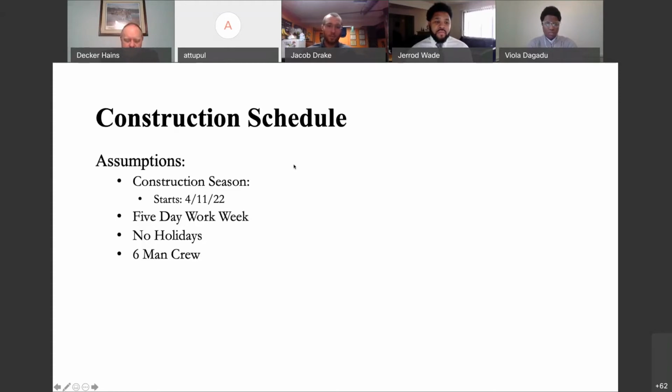We used BWL standards for a 5-day work week, no working holidays, and one single crew. Part of the reason we're only using one crew is because this shows us the longest this project should take from beginning to end. And also it'd be the most expensive this project would be. So if BWL had an extra crew, they could get this job done faster, but we wanted to show at the longest, what could this project take? I will now turn this over to Josh Janowski to further talk about the construction schedule and the sustainability for our project.